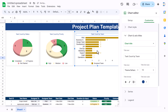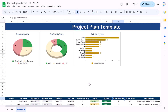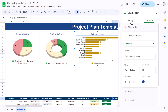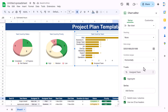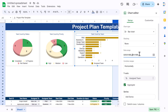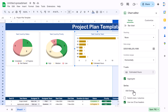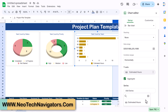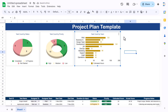If you want estimated hours instead of task count, we can use column J for estimated hours. Go to Setup, add the estimated hours series — column J — and set the axis to the assigned team. By mistake column I was selected, so correct it to column J and hit Enter. Add the series as estimated hours. Now the bar chart shows estimated hours by team.